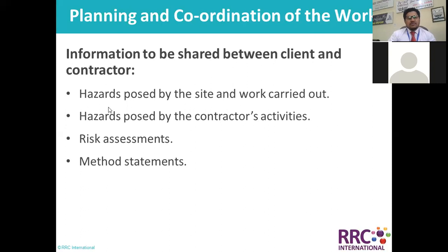And we can't get a work permit until we do a joint site inspection, until we have gas test results, and qualified people, that means their valid IDs. And if it is rigging and lifting above 40 tons, there are several other requirements. If it is excavation, maybe a pre-excavation checklist, plenty of other documentation we need to attach, then they will sign the permit. So that permit is also critically important, before we even start.